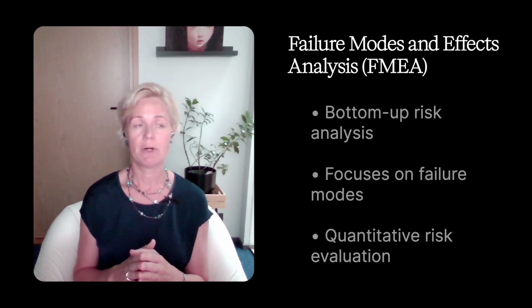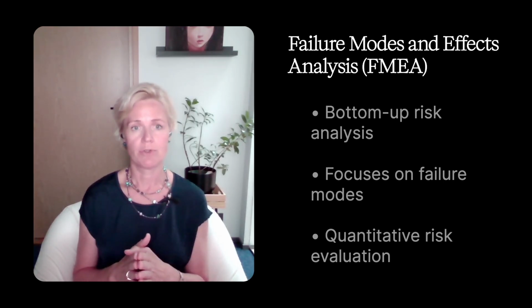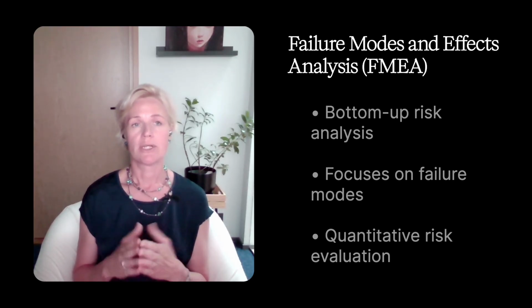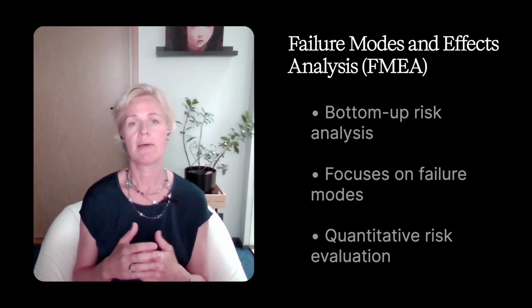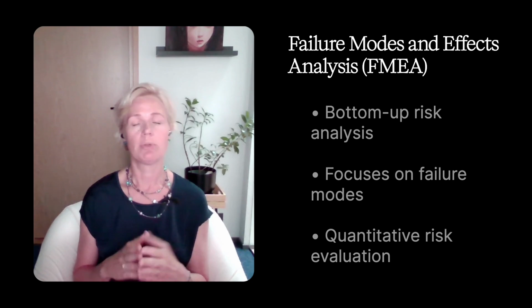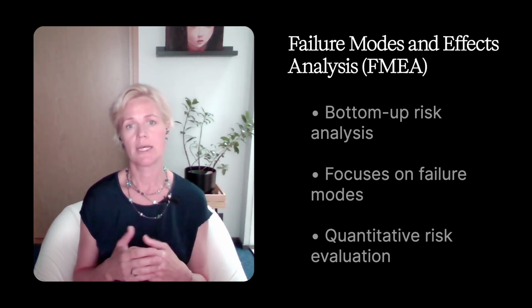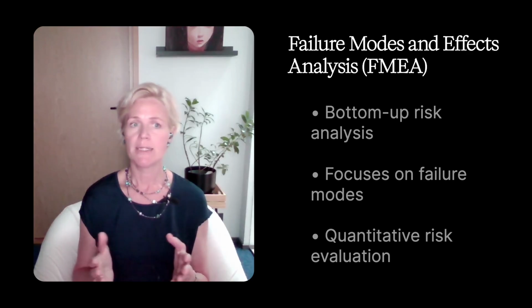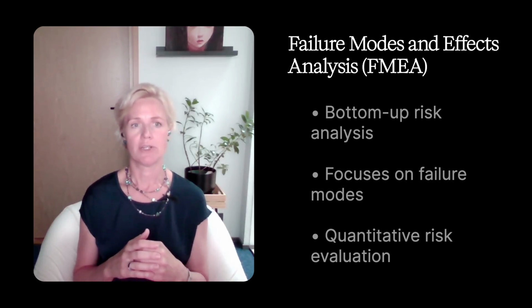FMEA stands for Failure Modes and Effects Analysis, and it is a detailed bottom-up risk analysis approach that often complements the hazard analysis approach. FMEA focuses on identifying potential failure modes in components, processes, or software, examining the causes and consequences of these failures. It primarily uses quantitative risk evaluation, employing risk prioritization numbers that assess severity, occurrence, and detectability. FMEA is typically applied during the design and manufacturing phases to target specific risk mitigation actions.